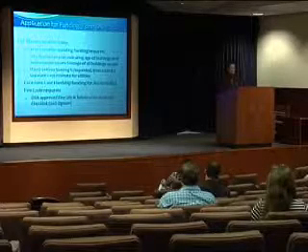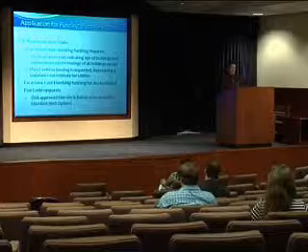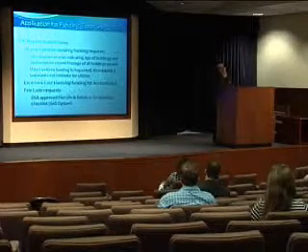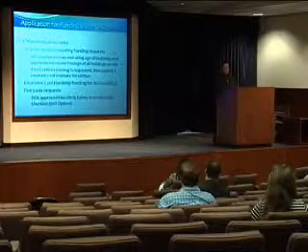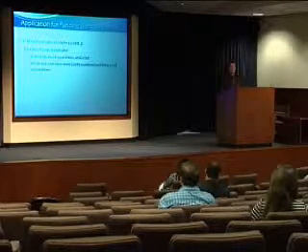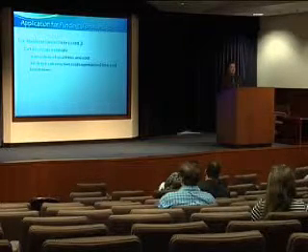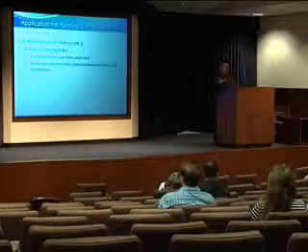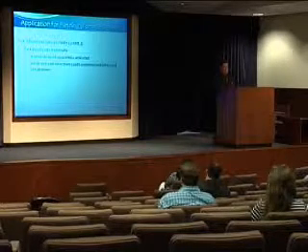For excessive cost hardship funding for accessibility and fire code requests, DSA approved fire life and safety or accessibility checklist. This is now only for the 60% option. You don't need to send it if you're doing the 3% option, only the 60%. Has to be a detailed cost estimate in that sense. So itemization of quantities and costs, no lump sums. Break out each element as it applies to the construction of your fire life safety and your ADA requirements.